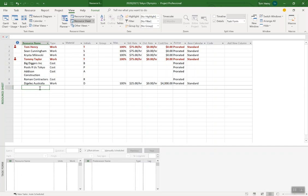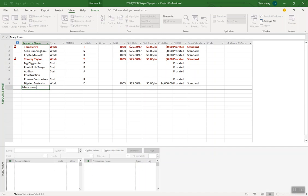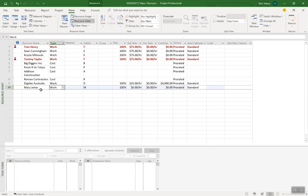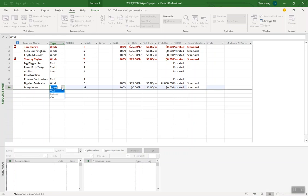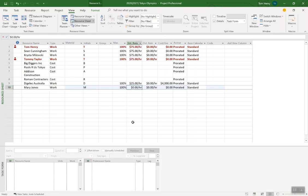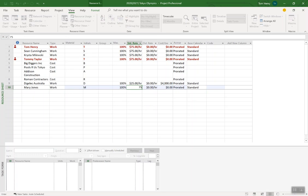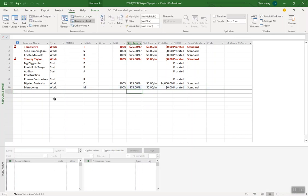I'm gonna add Mary Jones and you can see when you first create them, work resource by default. I've got other videos on this but we can create material resources, cost resources, work resources. We can also give them a standard rate, 75 bucks an hour and we're good to go. So build out your resource pool. That's the first thing. Once you've got that you want to have a good variation of work resources, cost resources and maybe some material resources.